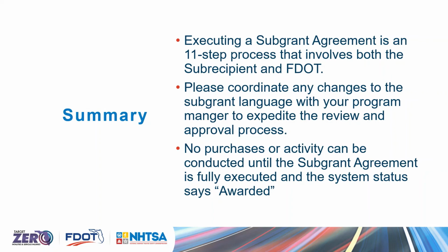If you coordinate with your program manager before making any changes to that subgrant language terms, it will expedite the review and approval process in the later steps. No purchases or activity can be conducted until the subgrant agreement is fully executed and the system status says awarded.